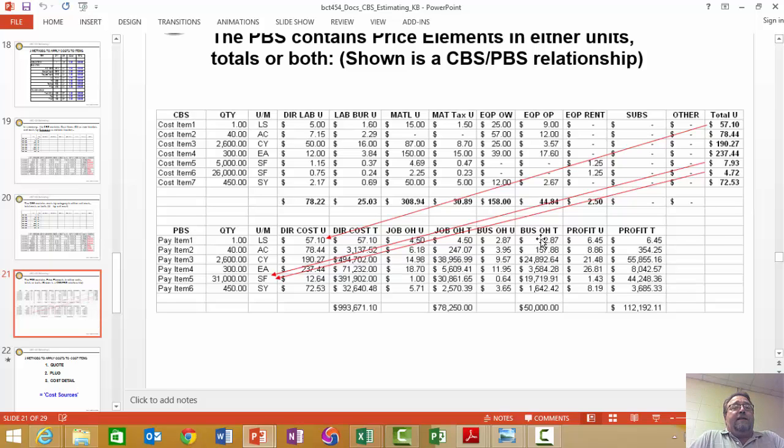What I say to that is if they're going to pay you for that, then make it a direct cost item. If they're not going to pay you for that, then make it job overhead. But usually they'll pay you for mobilization if you're not being ridiculous and trying to get a lot of money up front to finance things. And depending on the type of job, that's a big deal. I mean, mobilization costs can be huge, setting up your yard, moving all the stuff to it. I mean, absolutely.